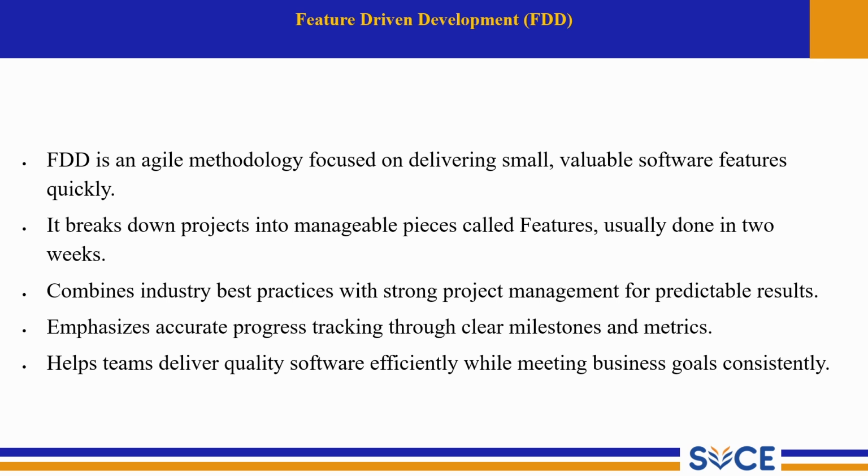And next point, it breaks down projects into manageable pieces called features, usually done in 2 weeks. In other words, work is still split into small chunks that can be completed quickly, which makes progress steady and predictable.